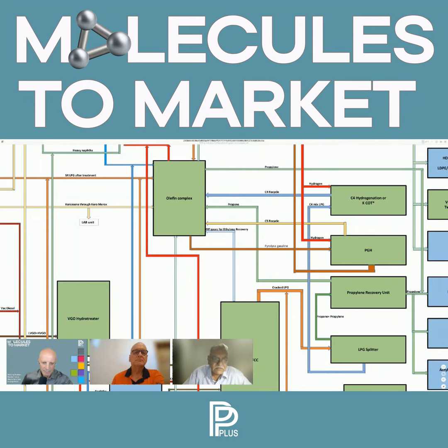One could also look at multiple desalination plants. So take the seawater, put a desalination plant there, create raw water, and pump that raw water into the project site. It is a lot of expense. It's a lot of money, but that's the basic infrastructure development one has to do. So water sourcing and the costs thereof is another important interface which we have to look at.